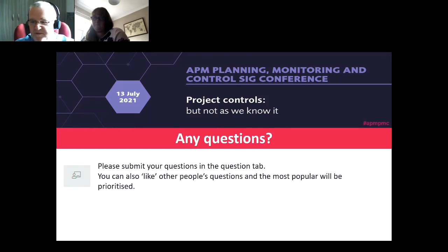It was the rest of the users who didn't see the benefit to them, because we were asking them to now put things in the system which was kind of on top of the day job, and it was like, well, why can't I just manage this in Microsoft Project? Well, because if you do that, nobody else can see it, only you, and it could be anywhere on the shared drive, and they're not linked together. As soon as you put them all in Planview, all of a sudden everything's linked.